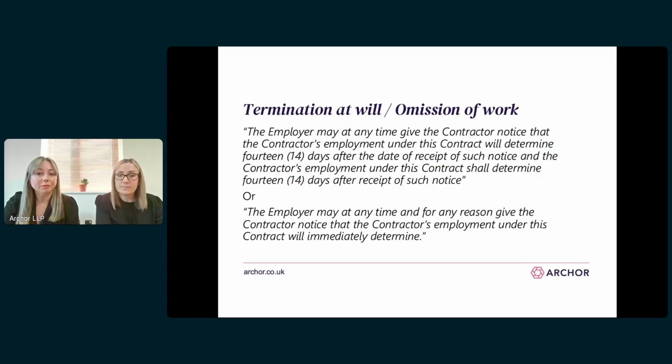As you can see from the wording on this slide, this is just a couple of example clauses we see. The first amendment allows the employer to give a notice to the contractor terminating its employment by giving 14 days' notice. This is a termination for any reason whatsoever. The contractor doesn't need to be in breach, the employer has just changed their mind. You'll often find an employer insisting on a clause like this, or even the alternative wording, also on the slide, which allows the employer to terminate for any reason immediately, so not even having to give 14 days' notice first.